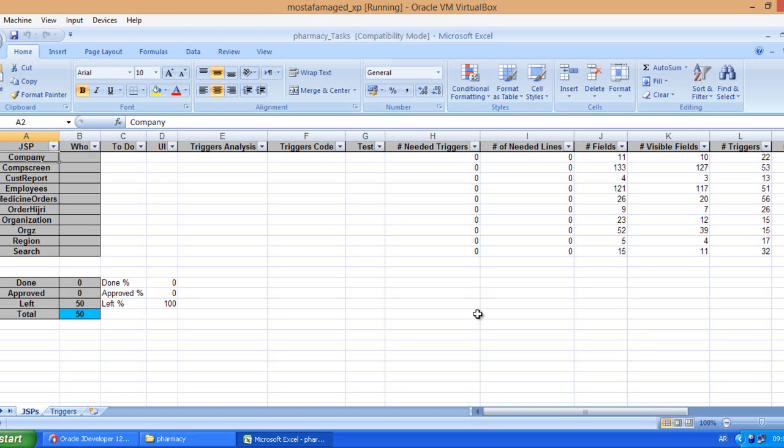So imagine that I have a project of 10 forms and I need to distribute them. Of course, I have junior developers, senior developers, team leader. So how is he going to distribute the forms? He needs to open each form and detect its level of complexity in order to correctly assign it to the correct person. But of course, it will never be accurate. Otherwise, you need to spend a lot of time for studying only.